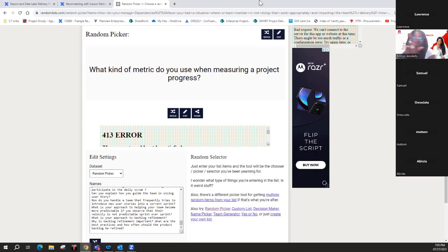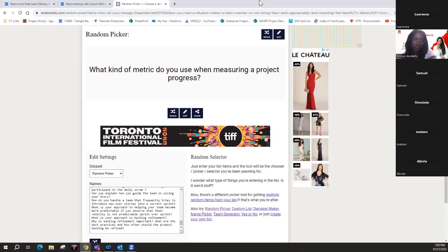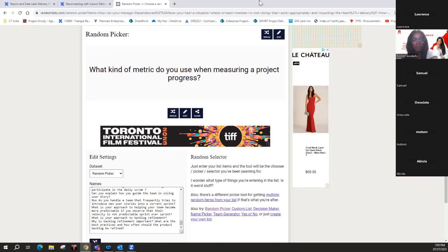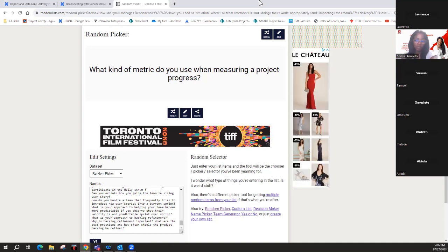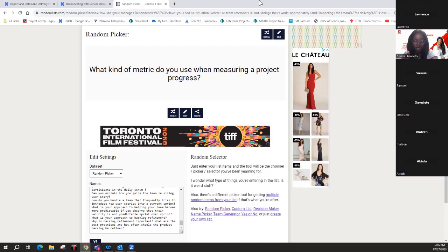So there are two things. Yeah, there are two reports you mentioned now. They're not the same thing, right? Your velocity report is a separate report, which you use to measure the team's velocity. So you're trying to see what they've committed to and what they've delivered, in a way to help them be predictable, right? Because with predictability, it means we might be able to estimate when we can finish the work. Yeah. Those are two different things.